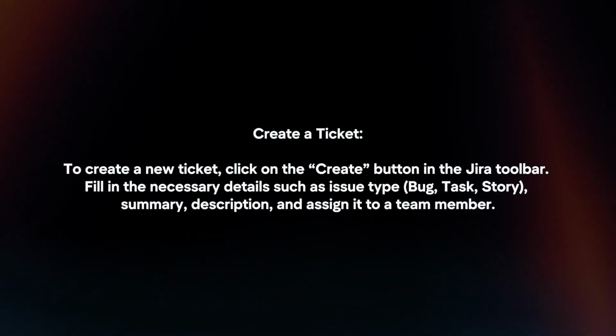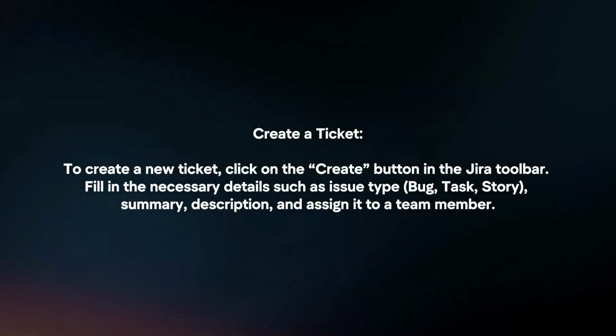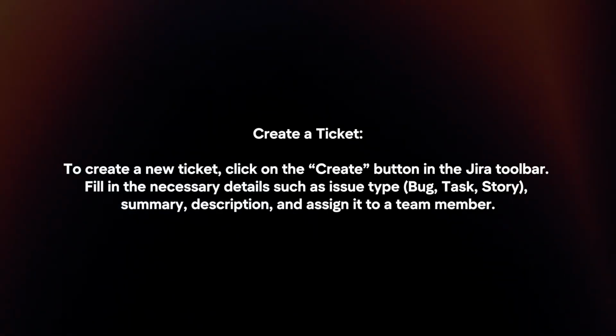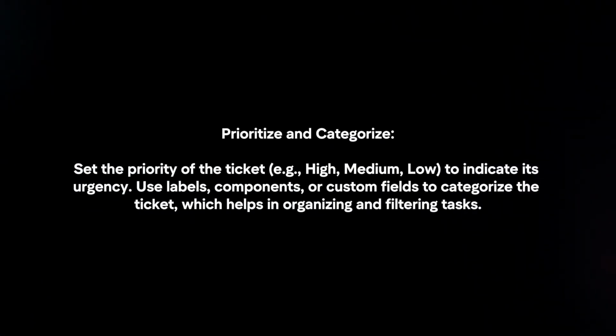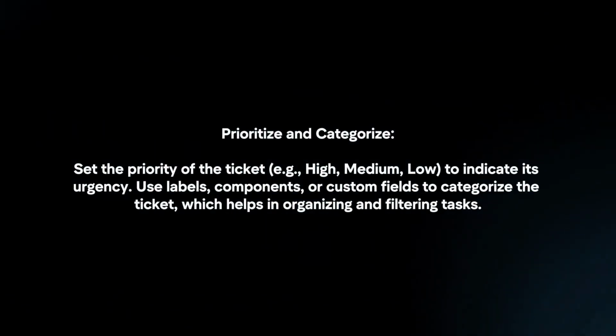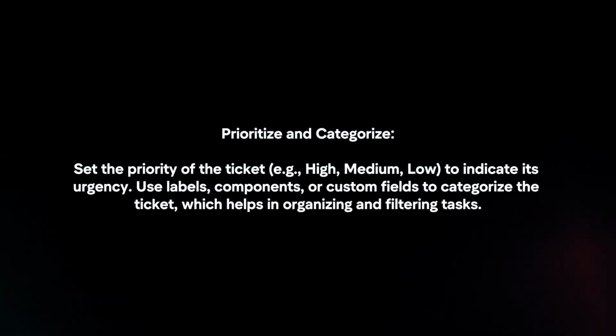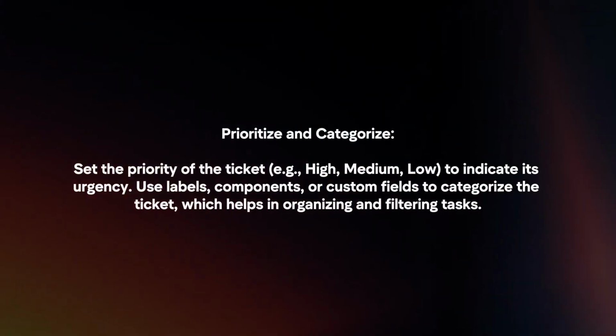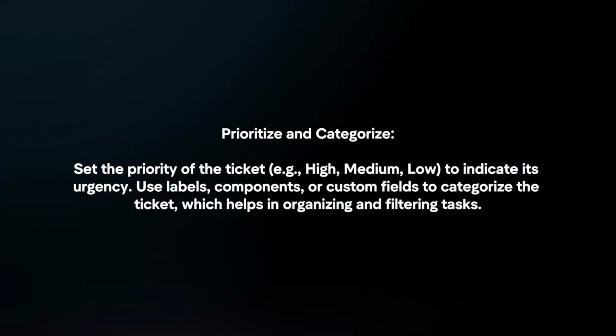Fill in the necessary details such as issue type, summary, description, and assign it to a team member. Prioritize and categorize. Set the priority of the ticket to indicate its urgency. Use labels, components, or custom fields to categorize the ticket, which helps in organizing and filtering tasks.